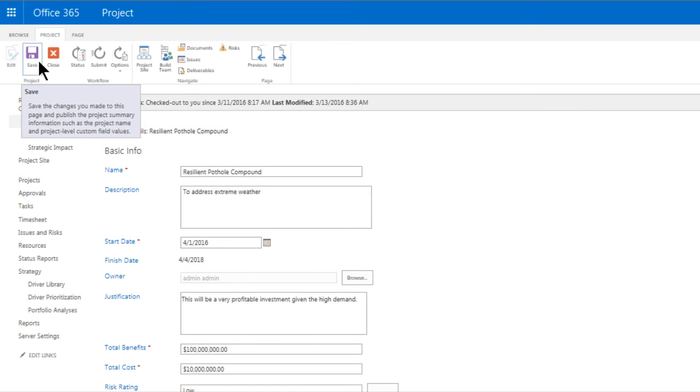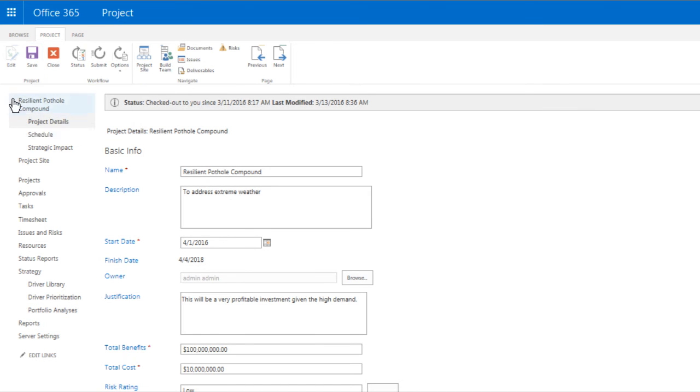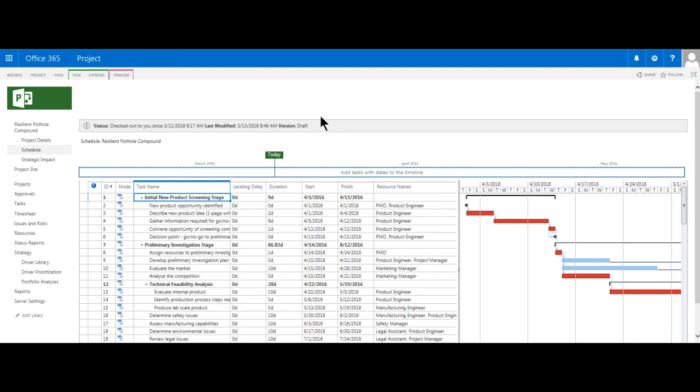Next, I'll take you to Schedule PDP, which according to our workflow is an artifact that does not have any required fields. It is this project plan that drives and determines the project's finish date that I pointed out a few moments ago. This project plan was derived from a template that was associated to the new product development enterprise project type we selected at the onset to initiate this proposed project. The scheduling functionality in PWA is a light version of the Microsoft Project Professional or Project Pro for Office 365.